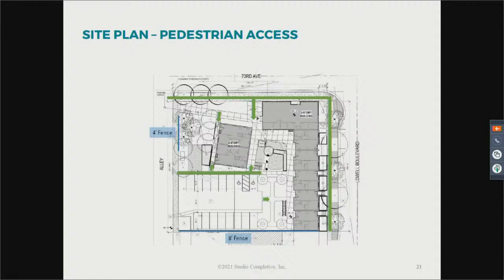And the 1% fund cannot be used to do the secondary services. It is only for main lines of the utility. So that is where the decision had been made not to get that underground at this point in time.